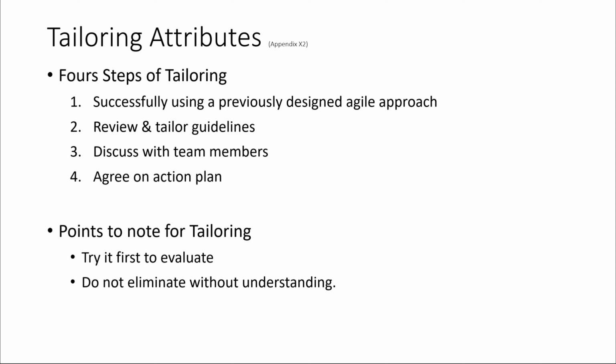Tailoring recommendations. Listed below are some good practices to consider before tailoring an approach. Beware of taking things away. Many of the agile practices act as a self-supporting pair. For instance, co-location and frequent business conversation allow for lightweight requirements since gaps in understanding can be filled quickly. Likewise, extensive ruthless testing allows for courageous refactoring, as one practice supports the other. Removing something without understanding or addressing its counterbalancing practice will likely create more problems than it solves. Agile approaches and agile methods are umbrella terms that cover a variety of frameworks and methods.